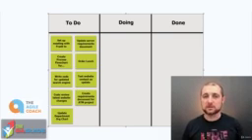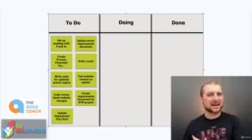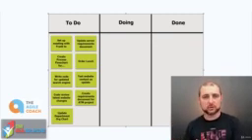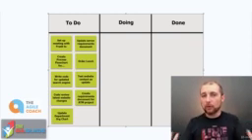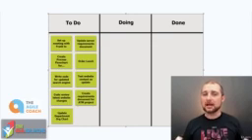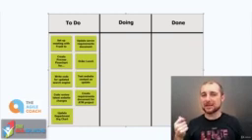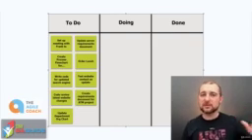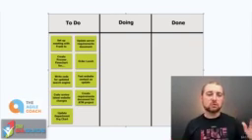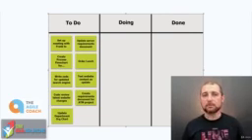In this case, everything's in the to-do. Now, as a team member working on this, I don't get assigned or tasked with work items with Kanban cards. Instead, Kanban is considered a pull methodology, meaning that I go out there and I pull work. I make a determination as to what is the highest priority and what task needs to be completed next. So I look at my Kanban board, and generally, regardless if it's physical or virtual, most teams will have the Kanban cards set up from the top being the most priority, the bottom being the least priority.